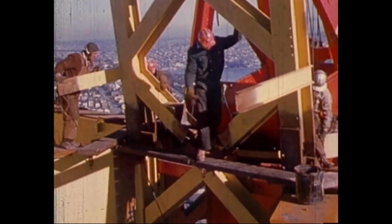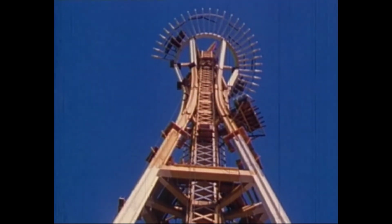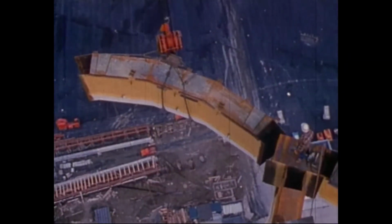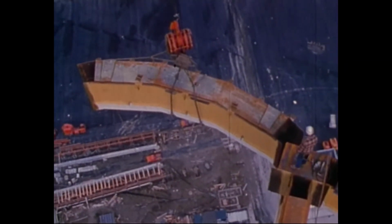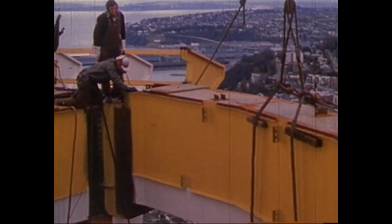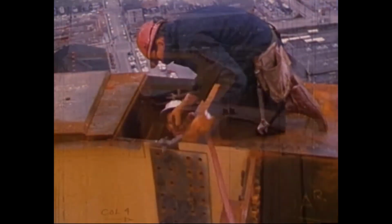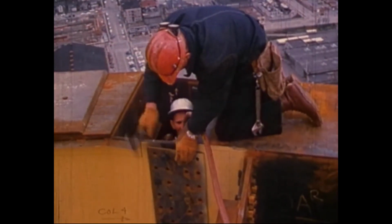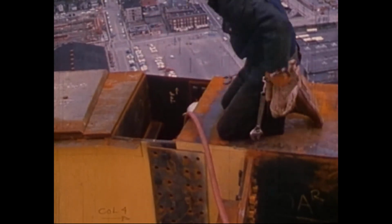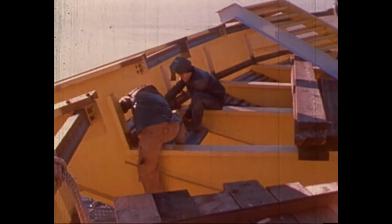Now the tower is almost ready for top house construction above the 500-foot level. The final girder section is raised to close the restaurant ring, but the last 7 cantilevered fins are still missing because there's a lot of lifting that remains for the derrick after it's made the last jump. After the pie is closed, everything else will have to go up by elevator. Corrugated decking, a subfloor at the restaurant level, goes on as a safety precaution during the work that follows.